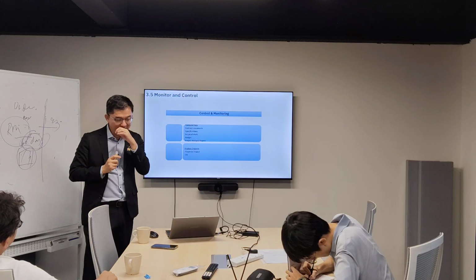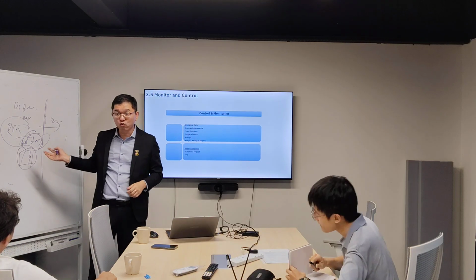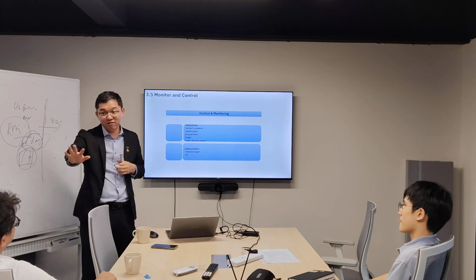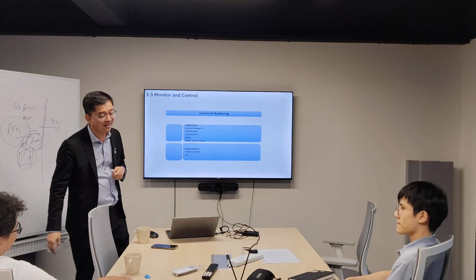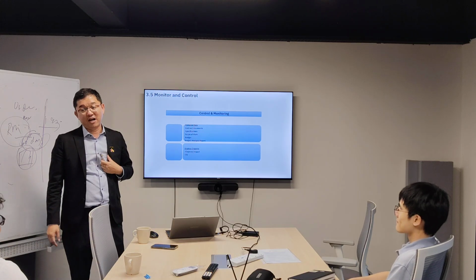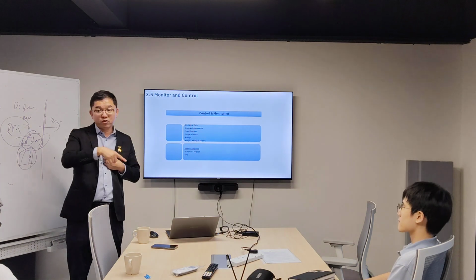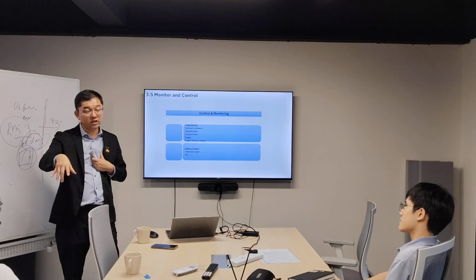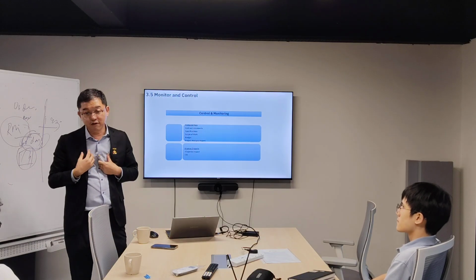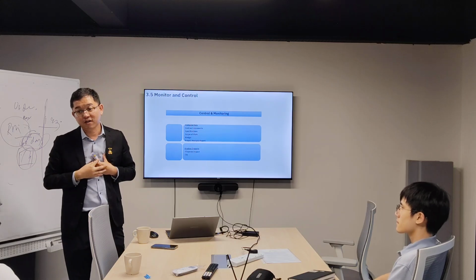As mentioned by Dr. Lee. Remember, if I ask you to do something and you directly do it already, without telling me the impact, I thought that it's free. So you do it already, you cannot dismantle the swimming pool, right? So by right, during the monitor and control process, I issue you this drawing, you need to tell me the impact first. Then, if I do not say anything, it means I agree, then you can proceed.